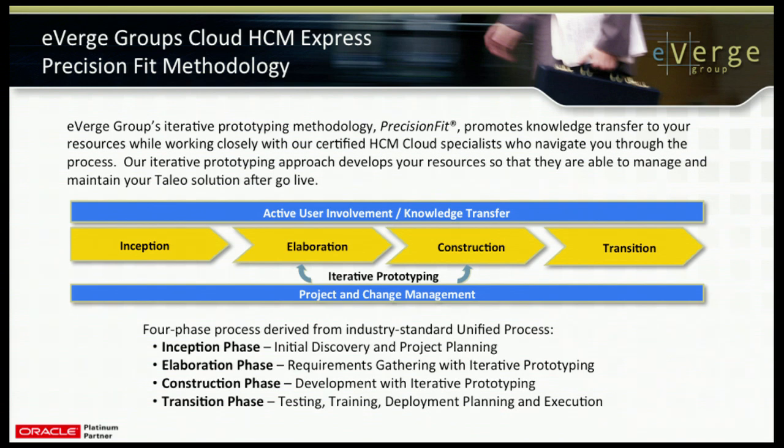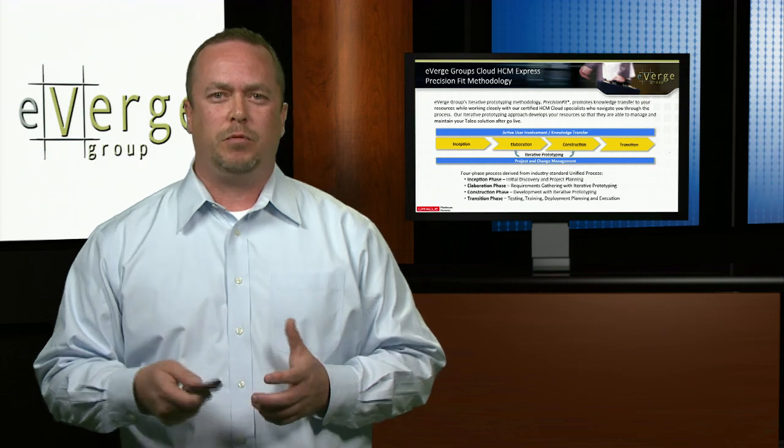At the end of construction, we move into transition, which is really our testing and deployment phase, as well as training. So within transitions, the customers are going through user acceptance testing. We're developing all of our training content and materials. And then at the end of the day, after user acceptance testing is completed, we move into deployment, which is go live. And typically at the end of our offerings or our implementations, we'll offer several weeks of post-production support. So in a nutshell, that's precision fit methodology.